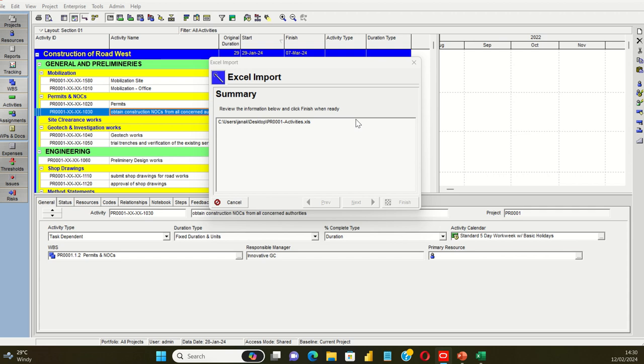First thing is you need to organize your WBS structure and get your activity list done, and then get the project activity duration estimate. And keep in mind, this estimate may not be the final activity duration for each and every activity. We might have to change these durations slightly depending upon the time frame we have for the completion of the project. But for now, I guess this is more than enough.